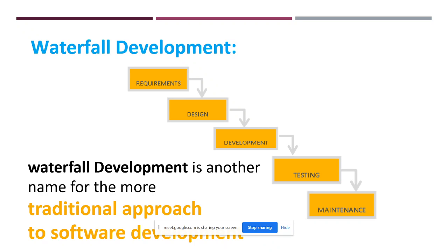And the second thing is, suppose the client wants to modify something, or change the design or anything in that application, then it's very difficult. Why? Just imagine the entire complex, big system developed, and the client wants to change something. If you change one thing, it will break some other thing in that project. So it is very difficult to incorporate new changes into an existing project. Those are the pitfalls in the waterfall model.